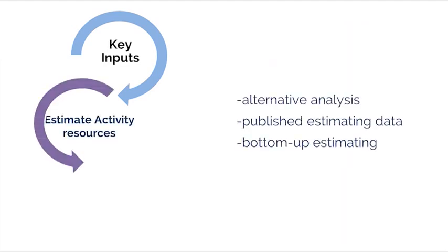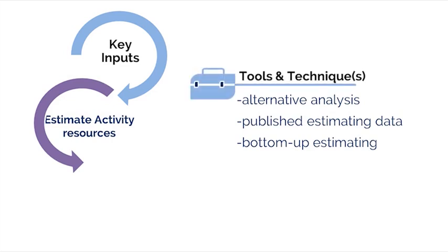The following are the key tools and techniques. Alternative analysis. Many schedule activities have alternative methods of accomplishment. They include using various levels of resource capability or skills, different size or type of machines, different tools, hand versus automated, and make, rent, or buy decisions regarding the resource. For example, you may have the option of either using an excavator or using shovels to move some dirt.